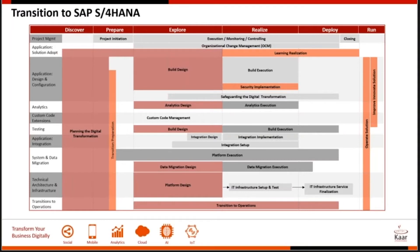For testing, this covers identification of test cases, test scenarios, planning, and execution. Tests include smoke tests, integration tests, regression tests, user acceptance tests, and performance tests. Each of these is run by a different set of people and has very different exit criteria. All of these need to be scheduled at the right point in the project after each system conversion, so we can progress to the final production conversion with greater confidence.